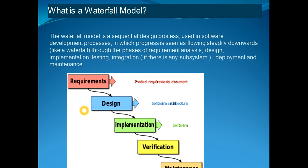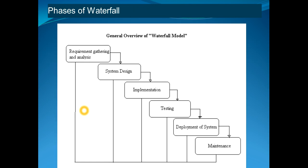The next phase cannot start until the previous phase is finished. The phases of the waterfall model are as follows. The first is requirement gathering and analysis. In this phase, the vendor sits with the customer and studies the objectives and requirements of the customer. The main deliverable of this phase is a specification document.